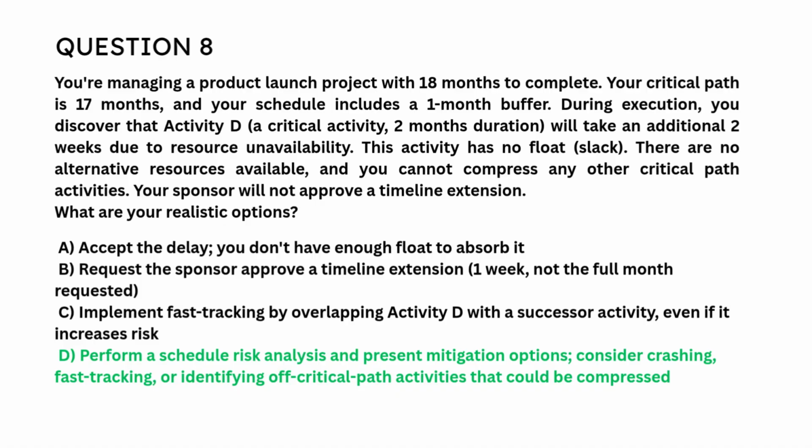Correct answer is D. Perform a schedule risk analysis and present mitigation options. Consider crashing, fast tracking, or identifying off-critical path activities that could be compressed.